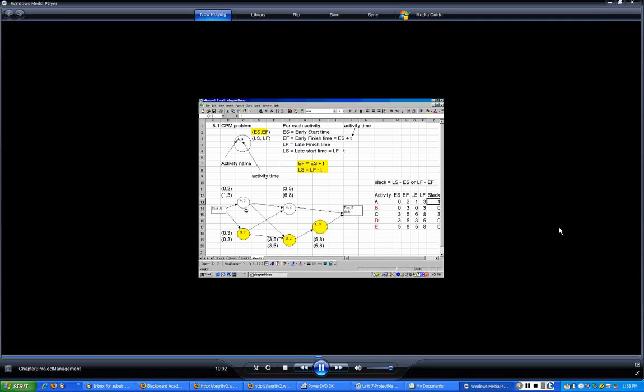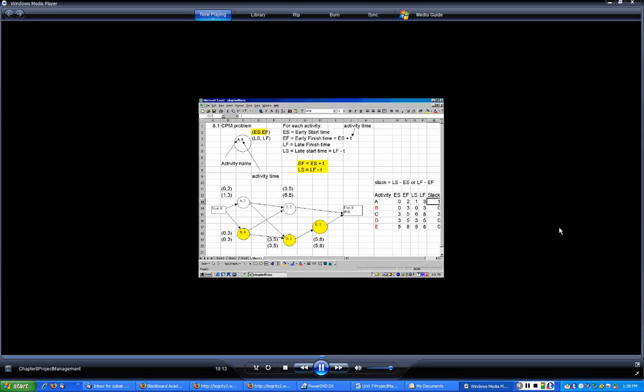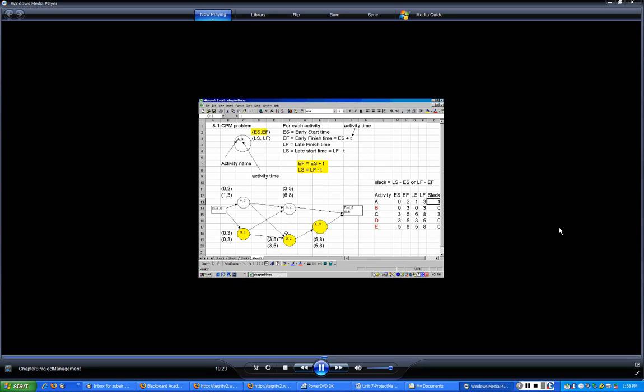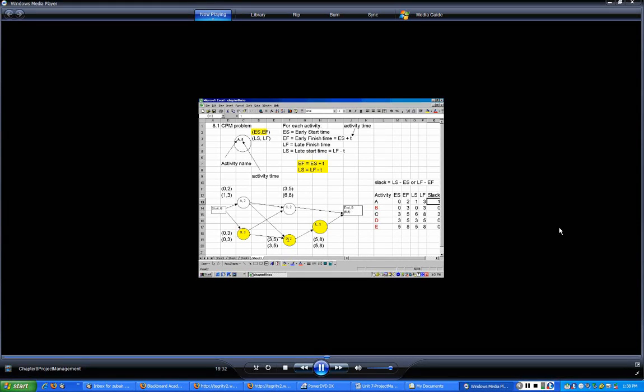So once you do that, the next activity is to make speaker travel plans. So for that is activity C, to make this travel plan. You should have selected the location and the speakers, then only you can plan. So that's why you have these arrows leading into that activity C. And also activity D is to prepare and mail brochure. Again, for that you have to select a location. Of course, you have to also choose the speakers, without which you cannot prepare the brochures and mail them out. So that's why you have the arrows going from there and from activity B into that.